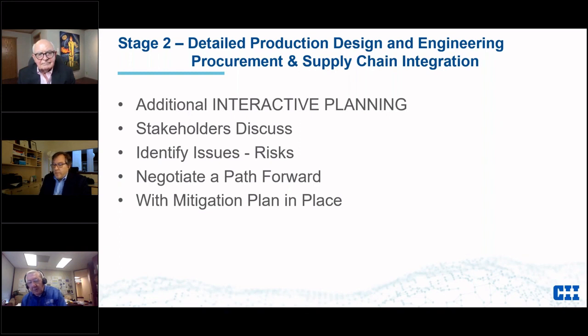So what we have to do is make some decisions early. Are we going to buy engineering? Can we go out and buy the engineering for this pump and get the vendor data? We may have to cancel it if the project for one reason or another goes south, but 9 times out of 10, the project is going to go forward. The trick is, how am I going to get the jump on vendor data and give my designers what they need? You're back to this: if you want this from me, what do I need from you? I need vendor data. You're going to hear that from every one of my designers.